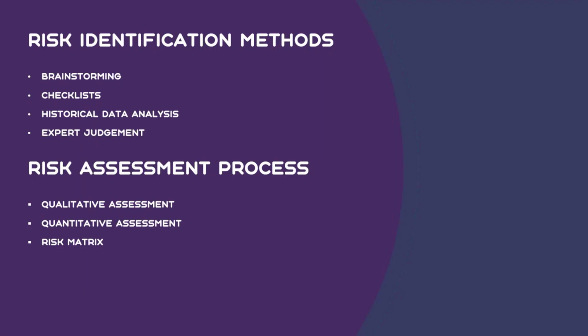So now it's the turn to decide what to do. That is called action points, or risk avoidance, risk management. Maybe we will increase the productivity, train the employees, do more negotiation with the subcontractor to reduce the cost, or ask for advance payment, or try to complete as early as possible, at least to save some money in terms of prelims.